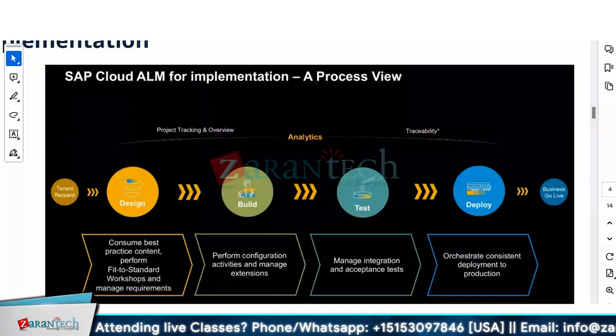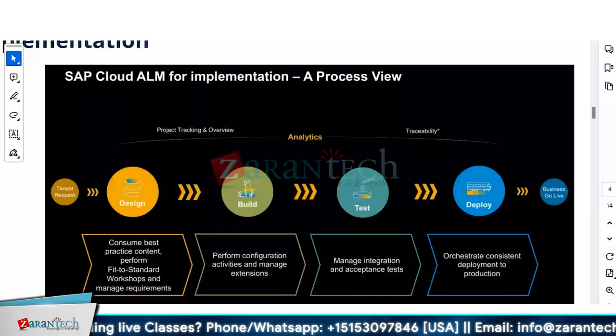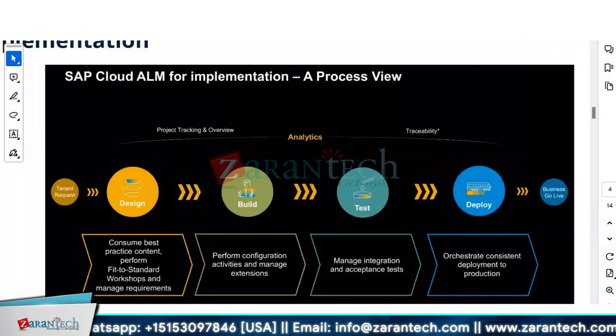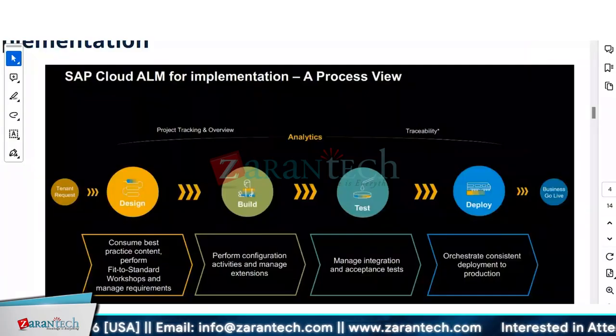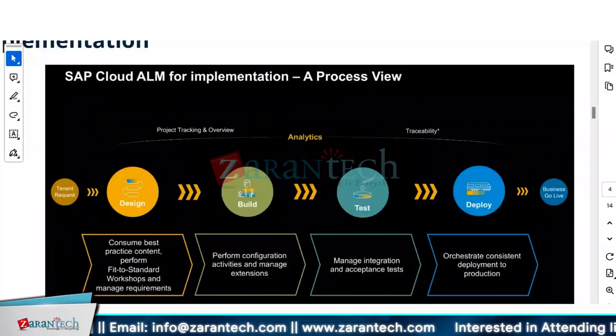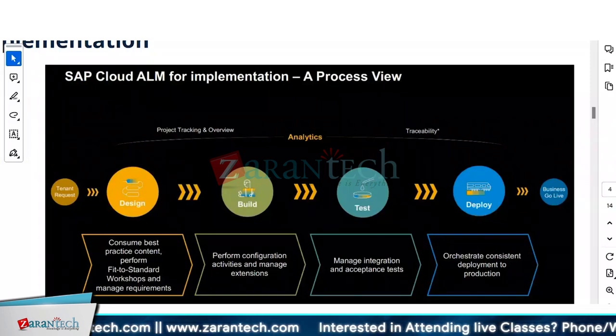If someone wants to see from test cases, how many test cases are there in total: there are 498 test cases and 238 have been executed. So you get a view that we are around 50%. So you can have analytics at each and every level of the different pieces of the implementation cycle, which we have covered a little bit.